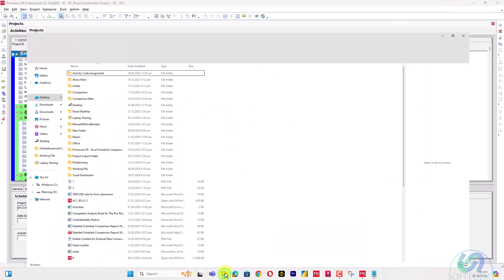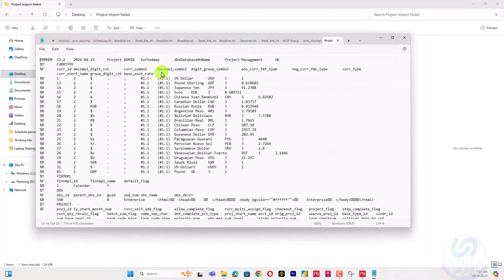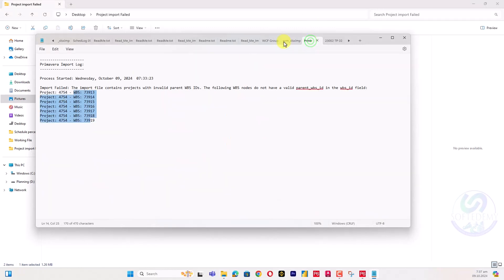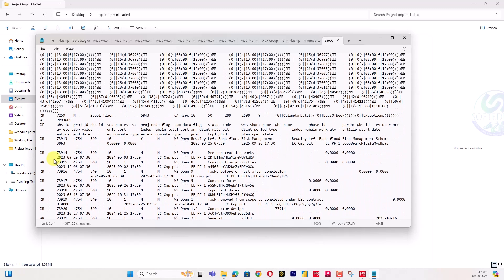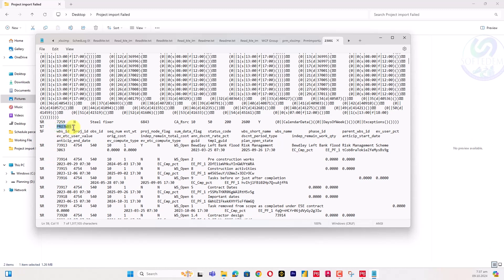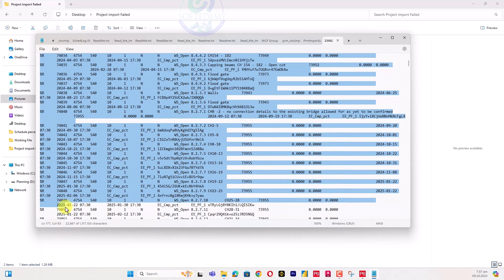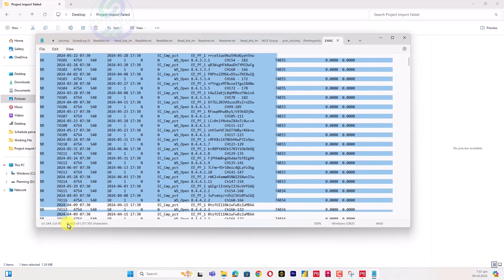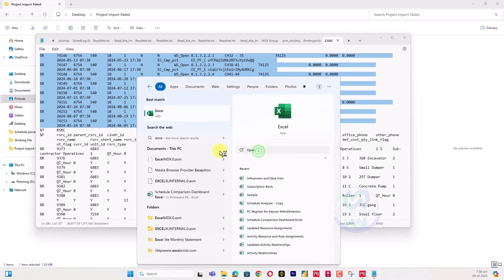Let's go to the desktop folder from where we imported the file. Open the XER file with Notepad and scroll to the bottom. The WBS section in an XER file starts with '%T' — find the WBS block starting from '%T' for the project WBS. Scroll down until you reach the Resource section, and copy everything from the WBS '%T' block up to (but not including) the Resource '%T' block. Paste this into Excel.